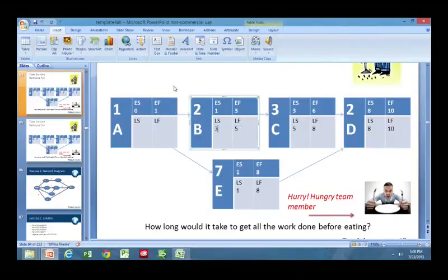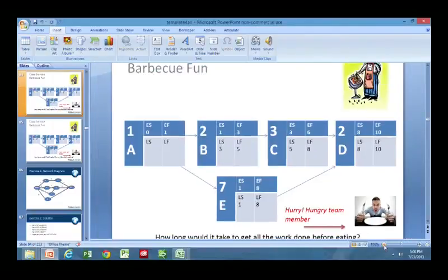So now, how do we complete the network diagram? To complete the network diagram, we have to take the lowest late start value. We take the lowest late start value and put that in the late finish box for A. That's the rule of thumb. Going forward, we took the largest number. The rule of thumb, when we use the 0 method, is going backwards, we take the smallest number. So the smallest number between 3 and 1, late start of 3 for B, late start of 1 for E, is 1. So we have a 1 there, and we say 1 minus 1 is 0.